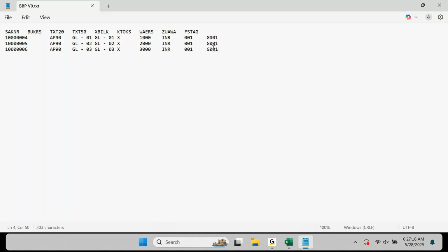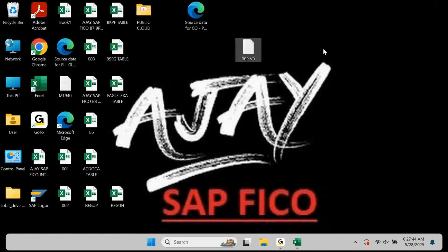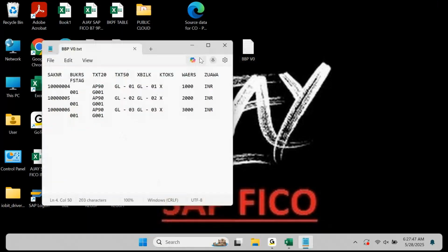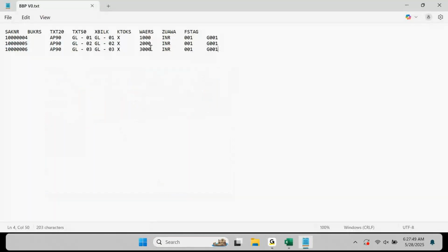Yes, sir. Now tomorrow if I want to see, because of any reason, why there is a delay or all this kind of thing, I should tell you made changes in the requirement, you have given additional requirement, additional information. In that case, do I need to tell you what changes you told me to do or not? How many times changes happened? If I keep editing the same document, do I know what was there in this document before I changed it to 2000?